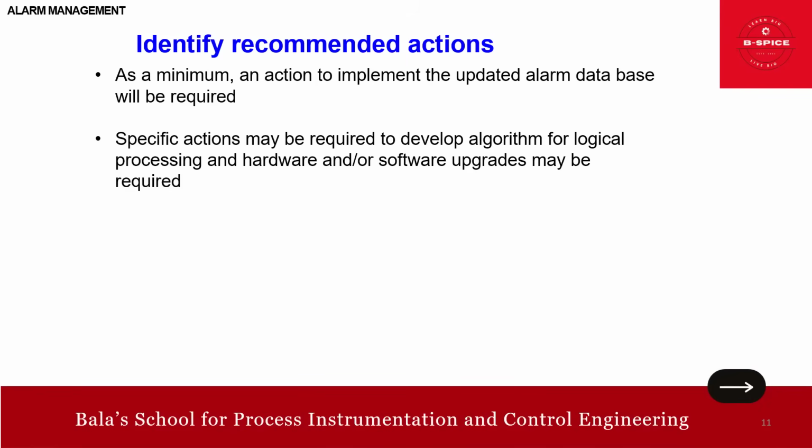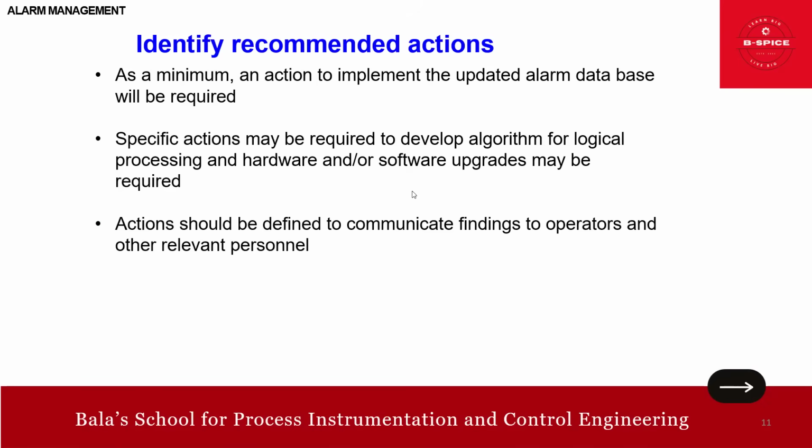This is for logical processing, and hardware or software upgrades may be required. Then action should be defined to communicate findings to the operators and other relevant personnel. And of course, the responsibilities and target implementation date should be assigned to all actions. So this is about identifying recommended actions.